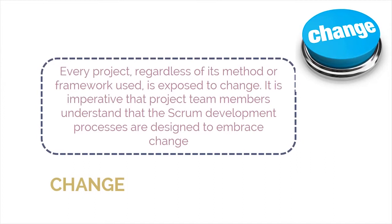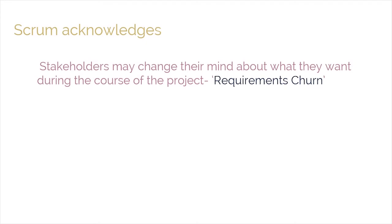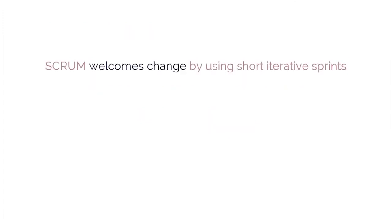The next aspect is change — another very important aspect of Scrum. Every project, regardless of its method or framework, is exposed to change. It is imperative that project team members understand that the Scrum development processes are designed to embrace change. Organizations should try to maximize the benefits that arise from change and minimize any negative impacts through diligent change management processes in accordance with Scrum principles. A primary principle of Scrum acknowledges: first, that stakeholders — customers, users, and sponsors — change their minds about what they want throughout a project, sometimes referred to as requirements churn; and second, that it is very difficult for stakeholders to define all requirements during project initiation. Scrum projects welcome change by using short, iterative sprints that incorporate customer feedback on each sprint's deliverables.